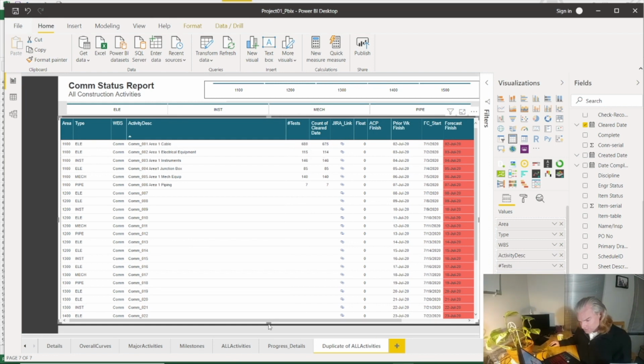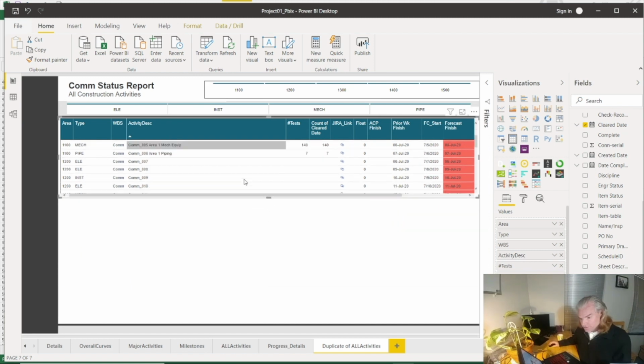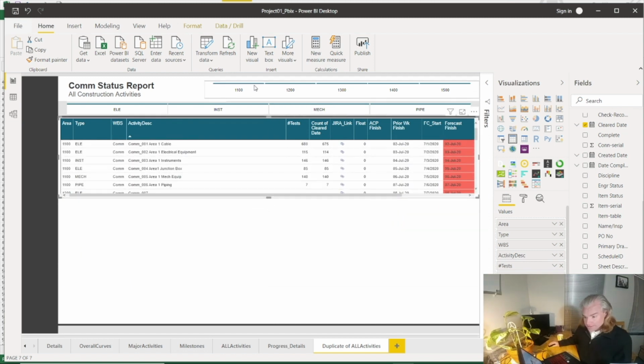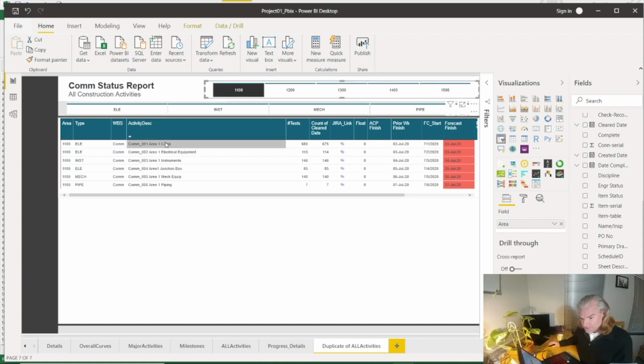So I'm just going to pull this up. Obviously, you'd be able to scroll. I didn't show the WBS structure. These are linked into a WBS structure. So this is the 1100 items. Those would be your 1200 items, 1300 items, 1400 items. Again, all these commissioning items should be linked to some test sheets. In this example, I've only done a couple for this one area, 1100.